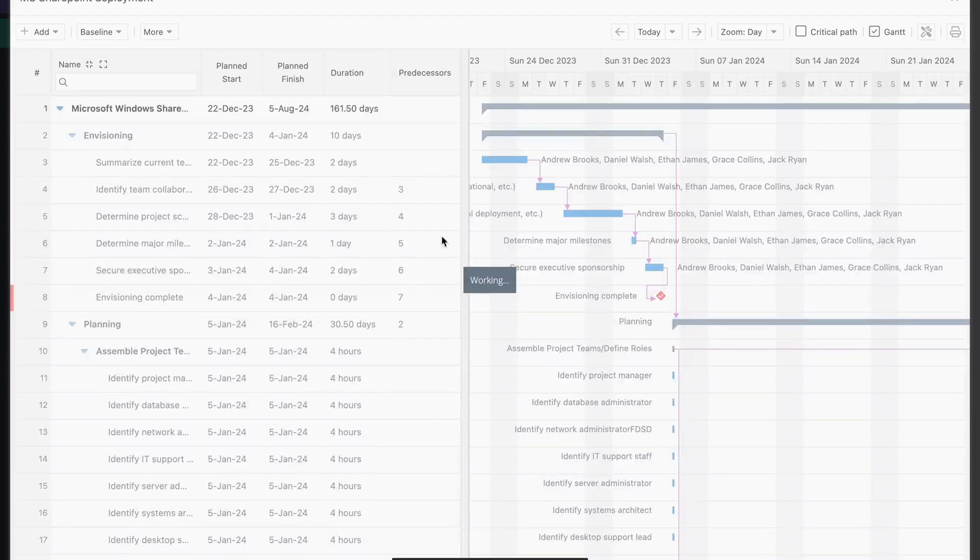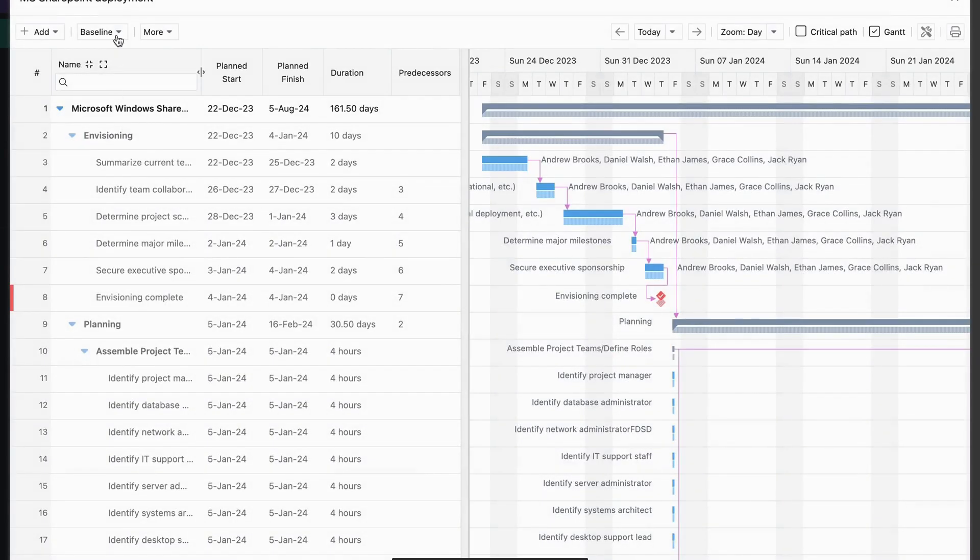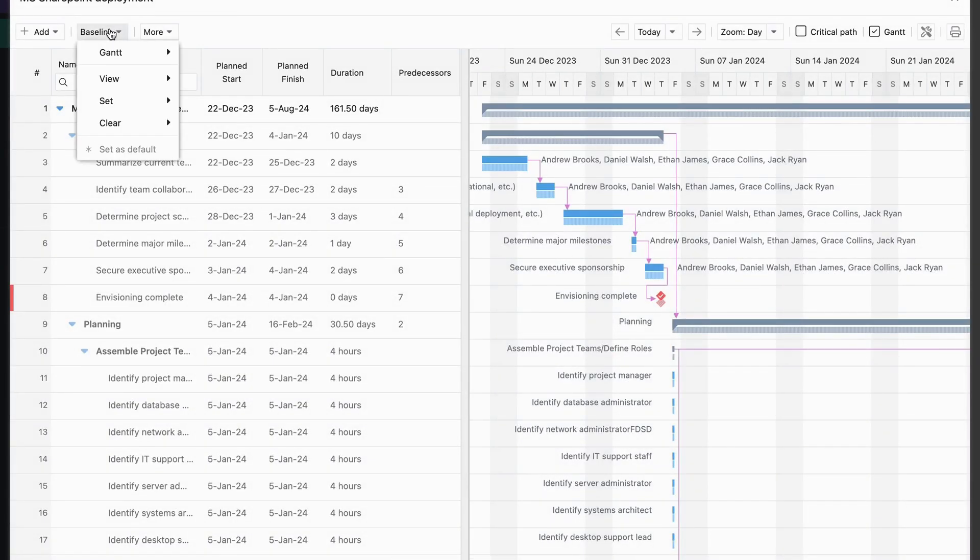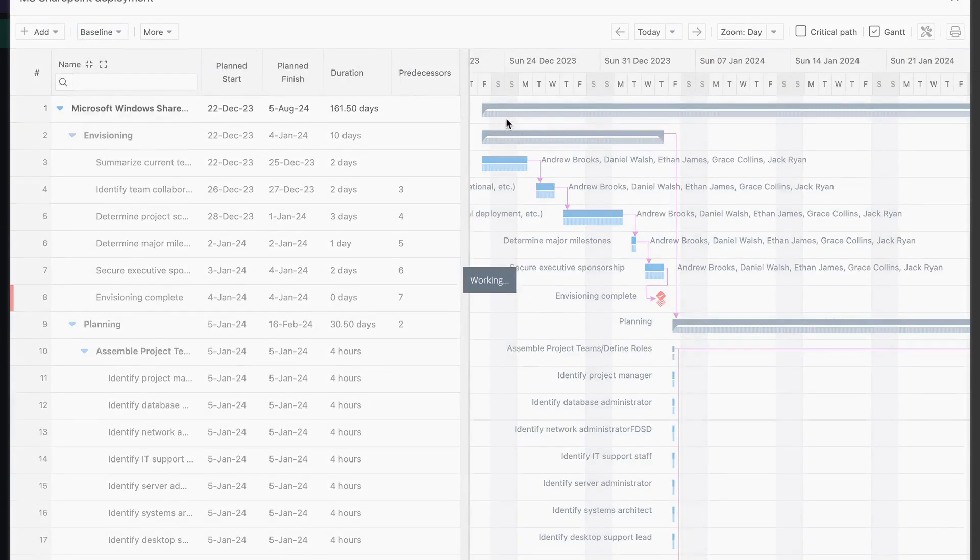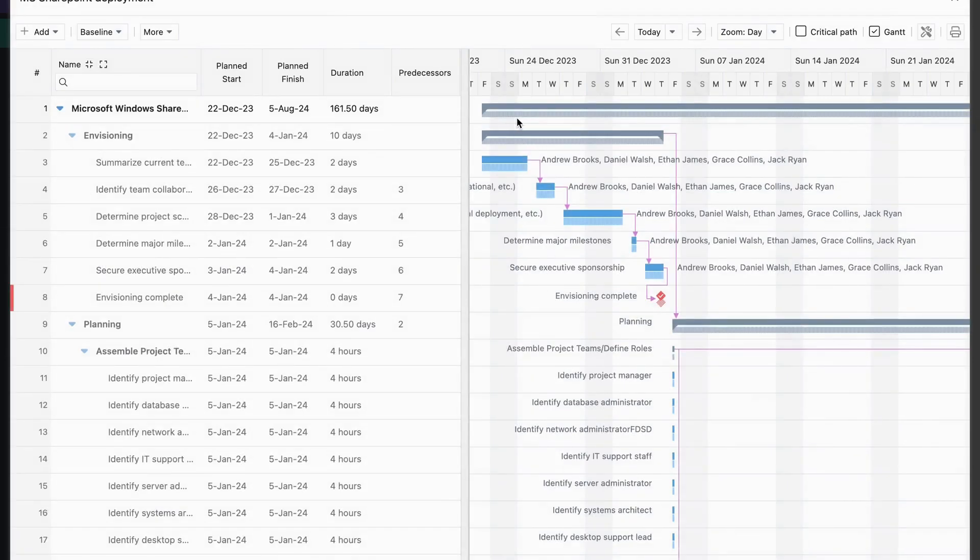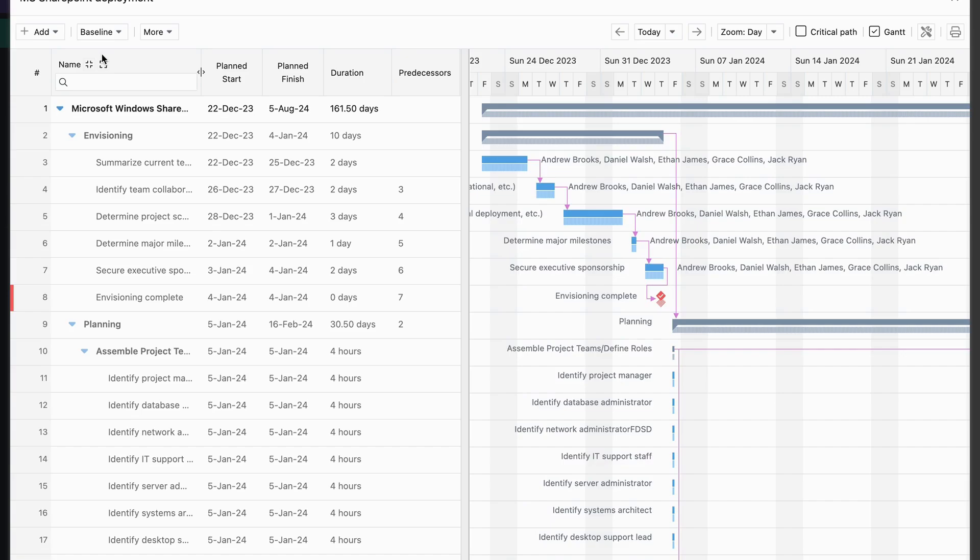Now, to view the baseline you just created, click on the Baseline option again and select View. The grey bar represents the baseline, while the coloured bar shows the planned schedule.